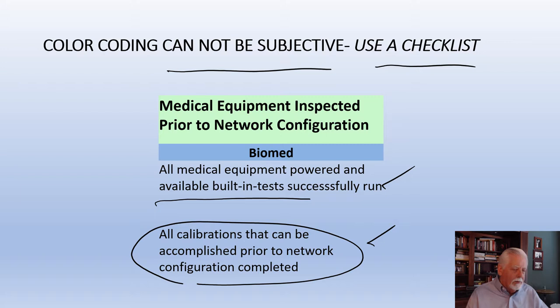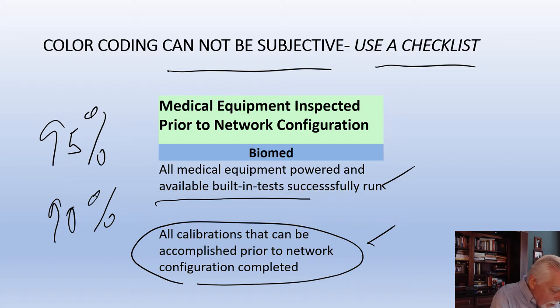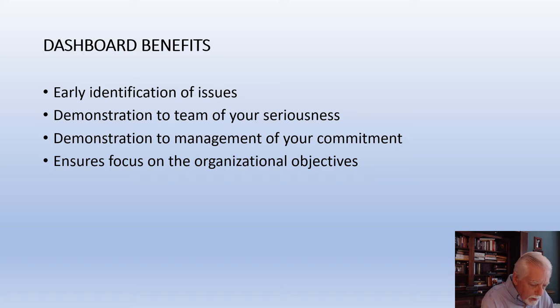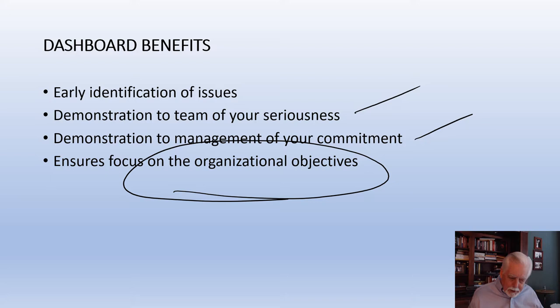Another example is staffing — a project manager can't just say 'I feel pretty good, let's make it green.' It can only be green if you're 95% staffed; 90% staffed is yellow; below 85-90% is red. Specific data must drive the color designation. The benefits: early identification of issues, demonstrating seriousness to your team and commitment to management, and if you select metrics correctly you can focus on organizational objectives — like getting a hospital to see its first patient.